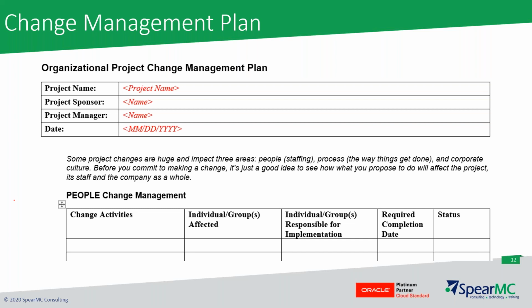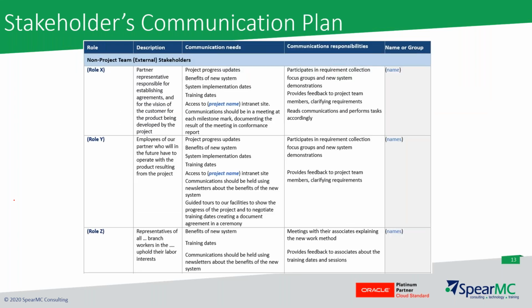And it's not just scope, it's people as well, right? It's for staffing, especially if you have a change in project manager, or you have a director of accounting that moves to a new role and someone moves in. It's very important you put all your changes in here and they're tracked so that it's very visible what's different today as compared to the beginning of the project. So a really good tool to have on your larger projects.